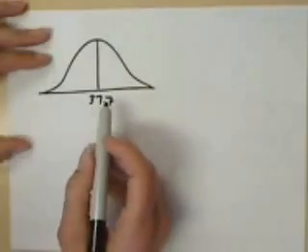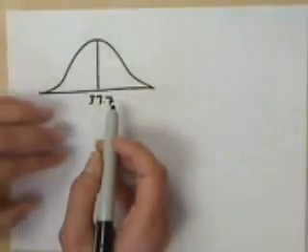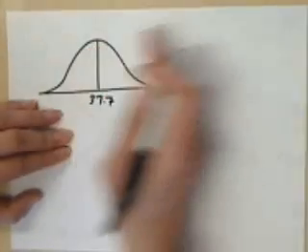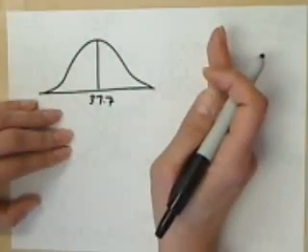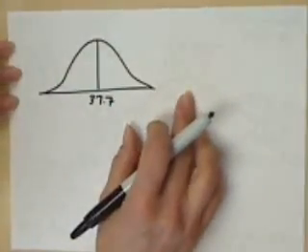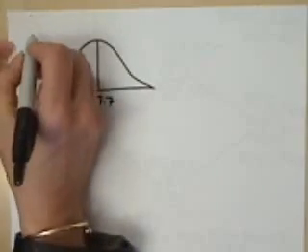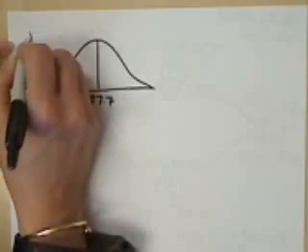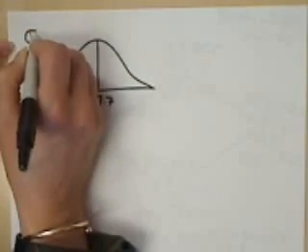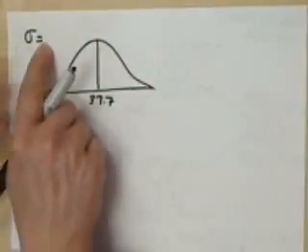That means that there's a 50% chance that the project will take less than 37.7 weeks, and there is 50% chance that the project will take longer than 37.7 weeks. So as with any random variable, if we know the expected value, we should also be able to compute the standard deviation for it. So the standard deviation for this project is what we're looking for.